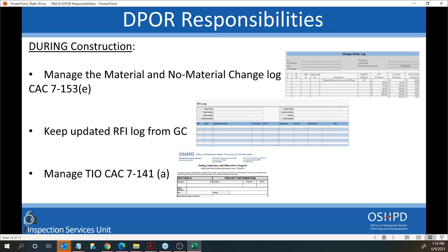Part of that means reviewing the status of all the required documentation: the project documentation, special inspector qualifications, TIO maintenance, directive change orders, change log, supporting documents, verified compliance reports, submittal documentation, shop drawings, and the ACDs, architect and engineer record observation reports. We mentioned the OIL list, the general contractor's quality control plan program, the notice of non-compliance log that the IOR would normally keep up and maintain, special inspector reports, test reports that may come from the laboratory, and the identification of any seeming errors brought to the attention by the IOR.